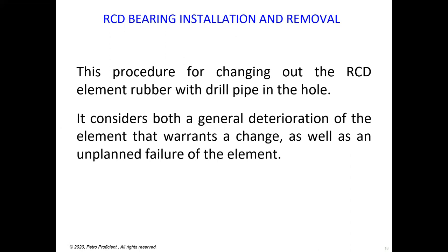A new bearing assembly is always kept available, so there is not much time lost in changing the bearing assembly. The new, refurbished, or redressed bearing assembly is always kept. It is picked up, lowered into the well, and the faulty one is then taken out, laid down and repaired. So consider, there is a certain time for this. Each bearing assembly has its own life, and we have to make sure that before the life is up, you replace it.